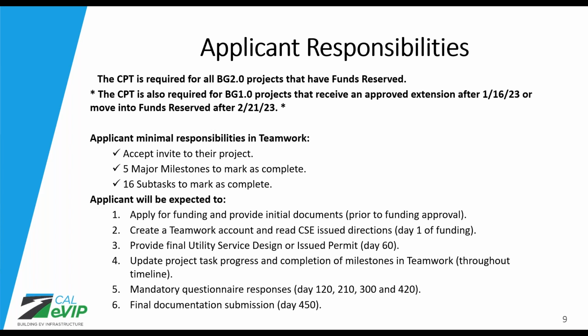You'll update project task progress and completed milestones in Teamwork throughout the timeline. Respond to questionnaires on day 120 and every 90 days thereafter, and then submit final documentation by day 450. Next slide, please.